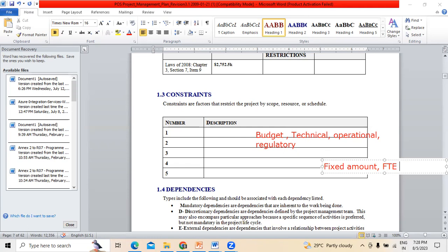Say, for example, $5,000. Let me put it this way. In $5,000, we are ready to complete the project, based on the requirement we have been given. So we will assure the customer that we can do it in $5,000. In $5,000, we are ready to complete this project, but with terms and conditions: there should not be any deviation in requirements further. If any deviations take place, it is subject to condition.